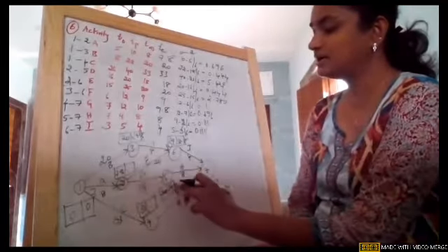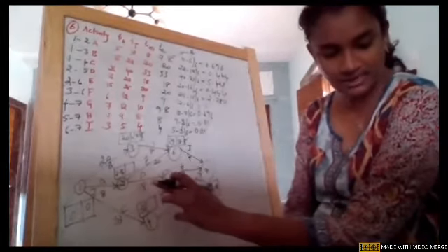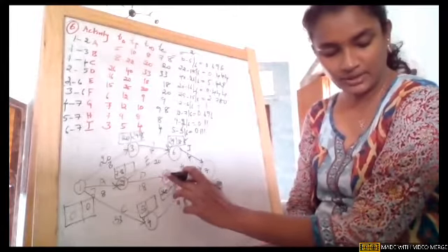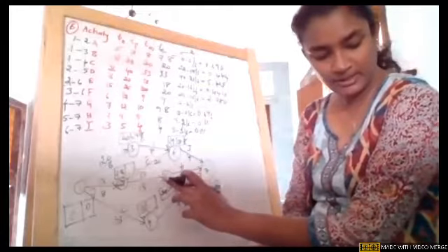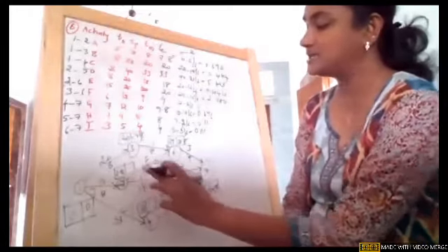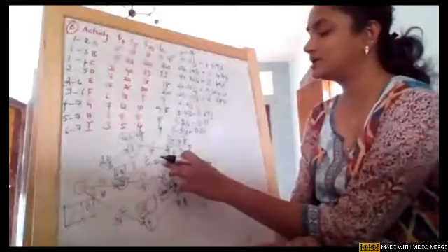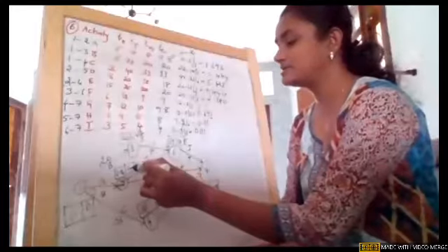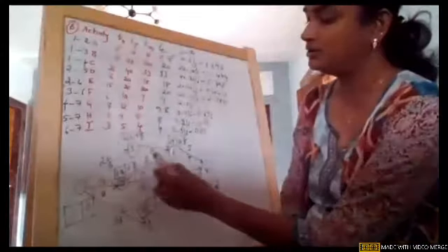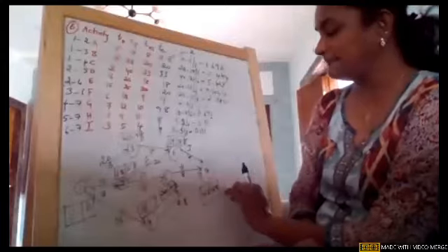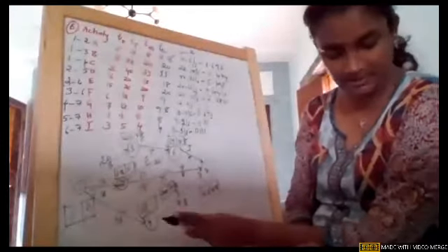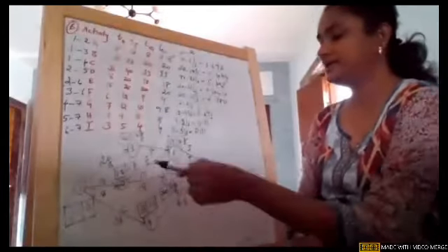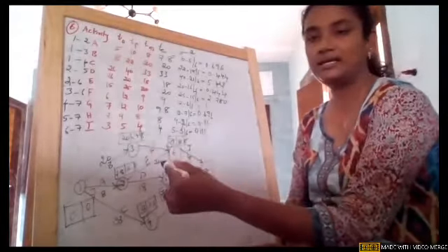So the two tails: 34.8 minus 18, which is 16.8, and 38.8 minus 20, which is 18.8. Out of these two, 16.8 is the minimum one, so I'm writing the minimum value. And for node 4, 42.8 minus 9.8 gives us 33. So this is how, when we see the rest of the nodes, the durations are unequal, the earliest and the latest time.